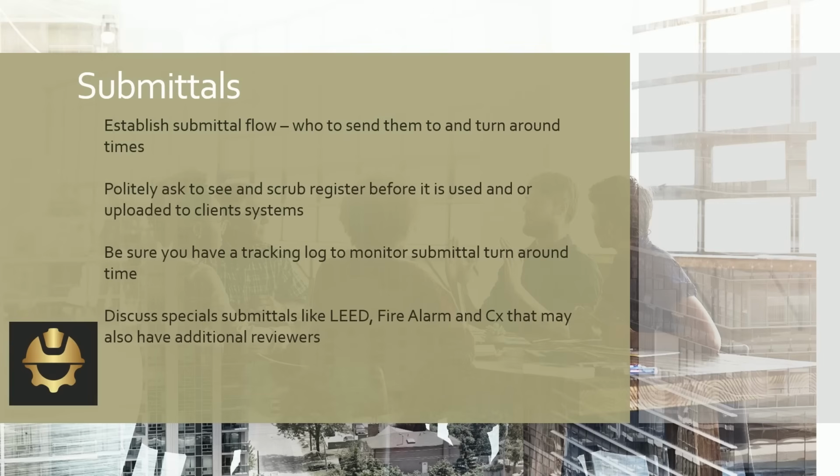Just like your client's going to have a required review time, your design firm needs to also commit to a required review time. I've seen that range from everything from 4 days to 14 to 30 on some submittals. So establish up front what they're going to commit to.